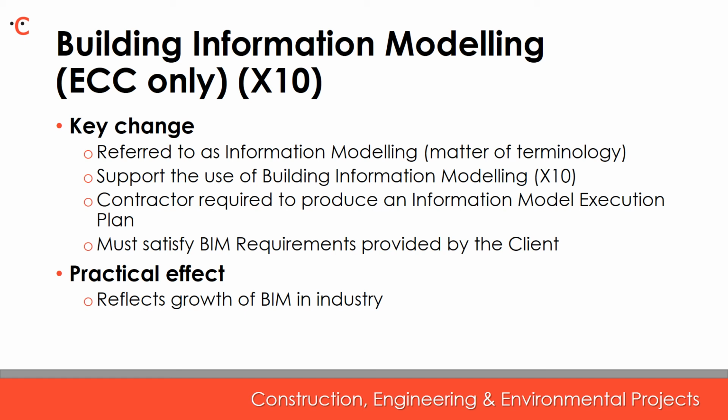The contractor is required to provide an information model execution plan to be incorporated in the contract either from the outset or within a defined period by the client. This will be in line with the BIM requirements of the client. This should reduce the need for Z clauses and recognises the increasing use of BIM, which is being driven by government policy. JCT, we should note, has also published provisions dealing with BIM in its 2016 form.